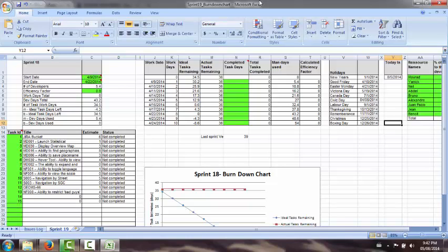So typically, this is just a ratio of the time that they're really spending towards development, and you might have to learn how to tweak this for your team. At the end of this, you will know how many days or units of work your team is able to produce towards actual development work for your clients. So let's say here 43.2.